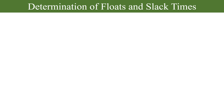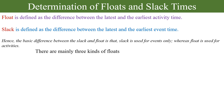Float is defined as the difference between the latest and earliest activity time. Slack is defined as the difference between the latest and the earliest event time. The basic difference between slack and float is that slack is used for events only, and float is used for activities. There are mainly three kinds of floats.